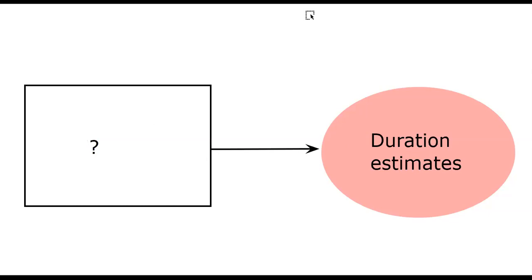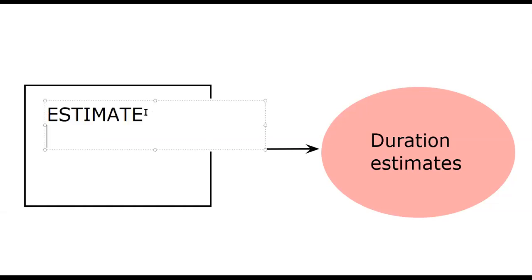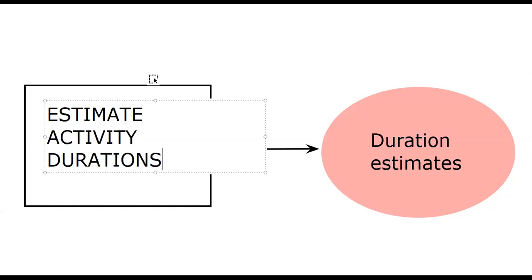The answer is none other than Estimate Activity Durations. And you do know there is a difference between activity durations versus resource effort. Effort deals with the number of hours worked, but duration is the passage of time. Phil could work 40 hours over a period of 10 months because he works 1 hour every week in a 4-week month.